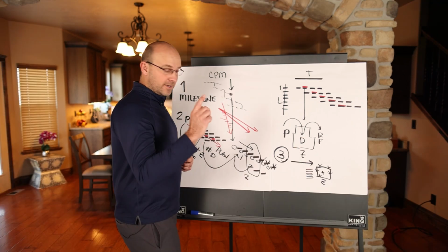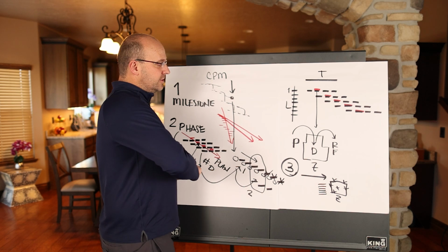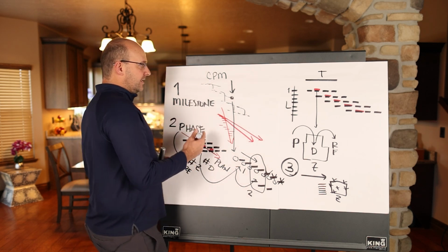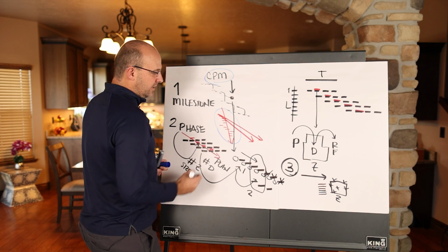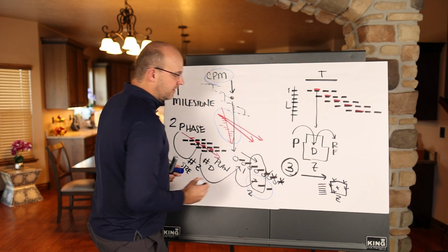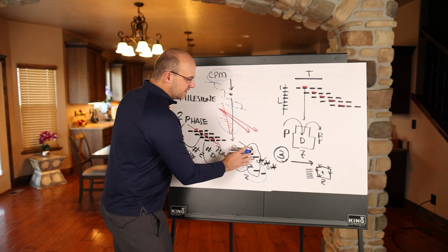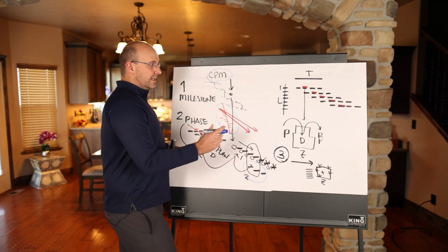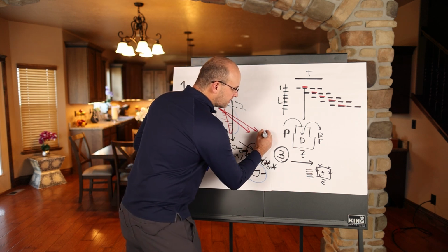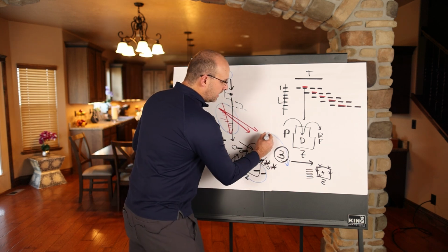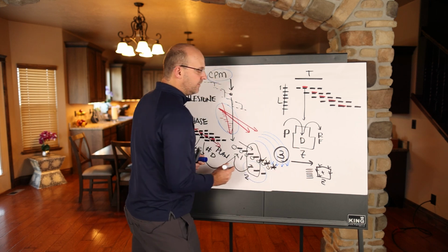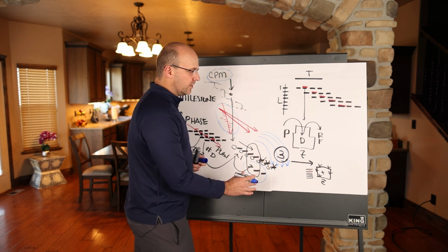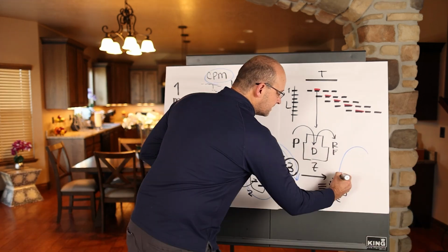Here's what I mean. I hope I can articulate this really, really well. Your general contractor, if they're bad, like I said, they're going to be using CPM, they're going to stack your work, and they're going to give you a hard time here about the flow of your work. Okay? If you can at least get to the point where you have flow, and they're like, oh, I'm behind schedule, keep adding labor, I want more crews, I want you to be busy, I want you to work overtime, all things that are going to tank your work, you point them to, let's make the work ready.